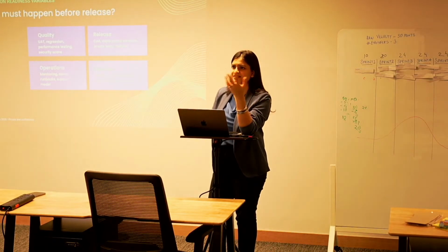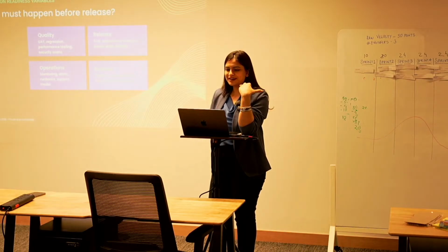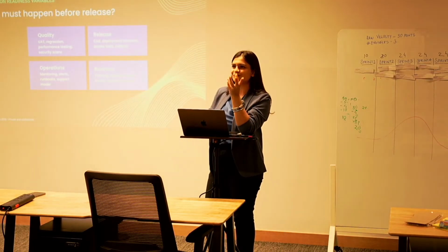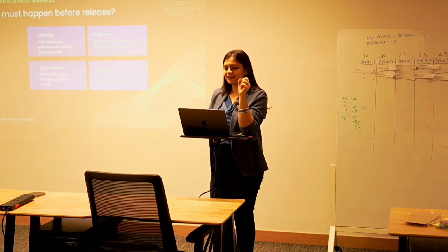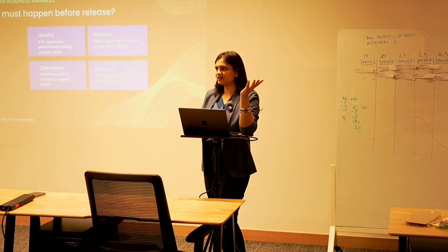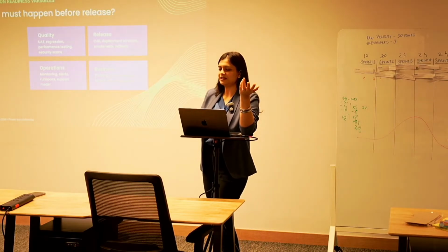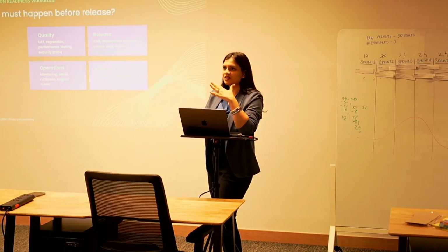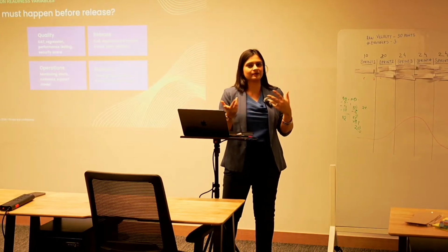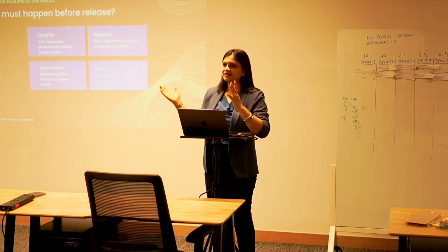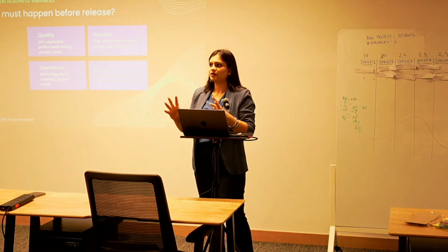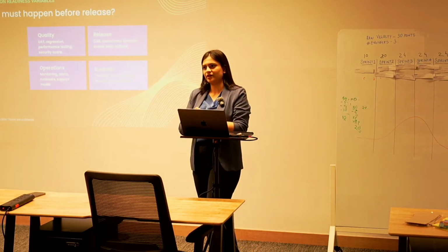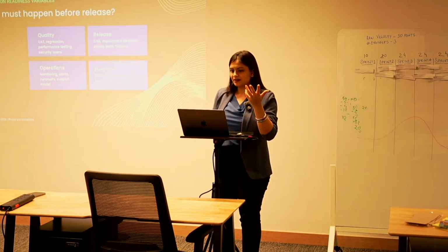And of course, the release processes. I'm sure every one of you here might have heard about deployment windows, booking it in advance, and making sure that the right people are there in it and stuff like that. And also defining a rollback strategy just in case your release fails. So all this has to be done. Typically, in my experience, it's been around 2 to sometimes 8 weeks. It takes that much time to only set things up so that they can be deployed in production. So yeah, very important.